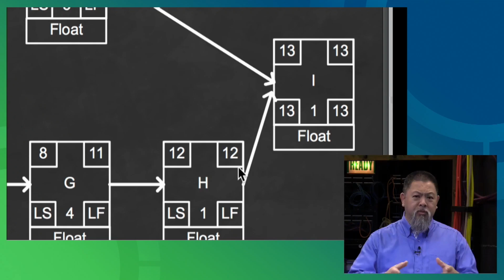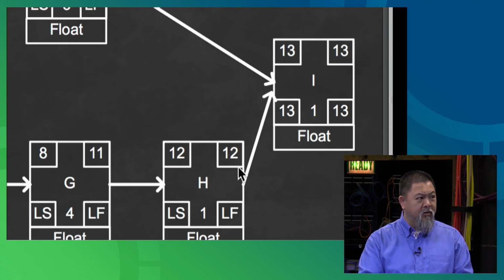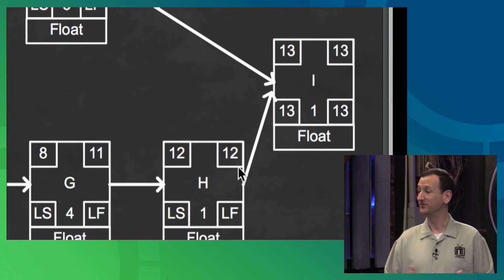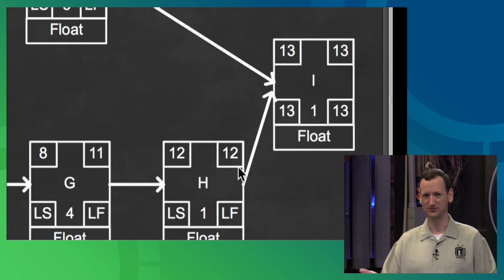Now, Don, at this point, once we're actually here at the end result there on I, you talked about calculating float. Is that important to calculate right here at the very end? Well, it is. Not so much here, right? When you're on the last activity, you never have float.